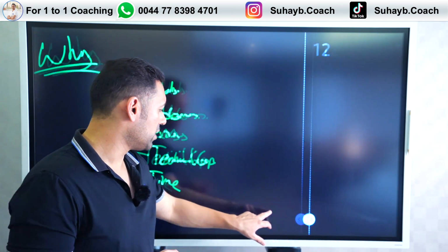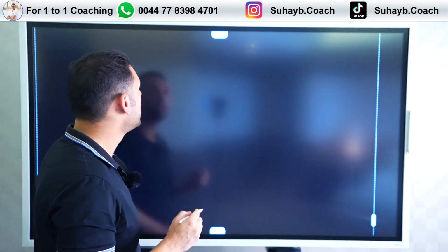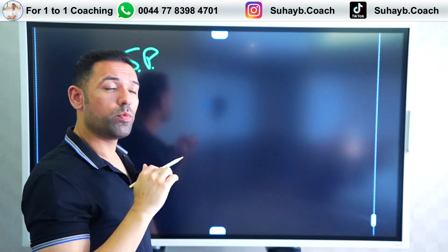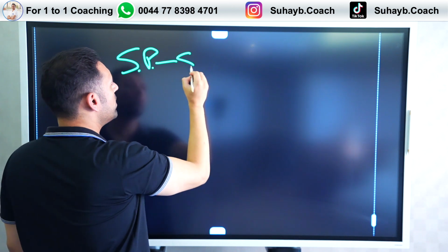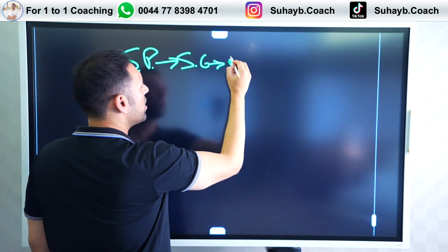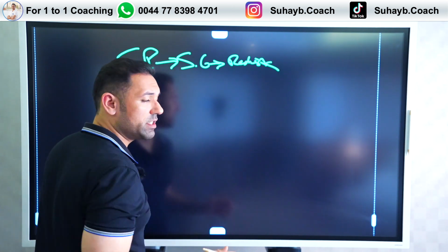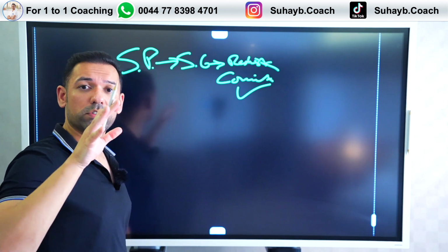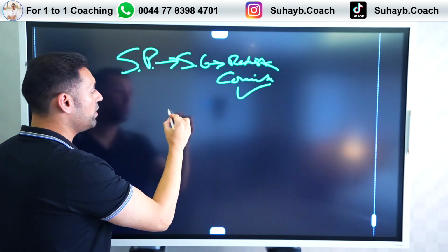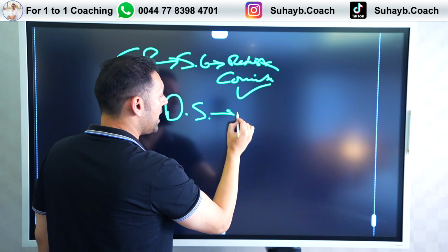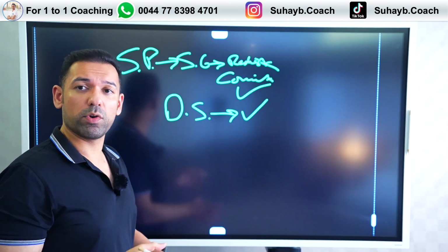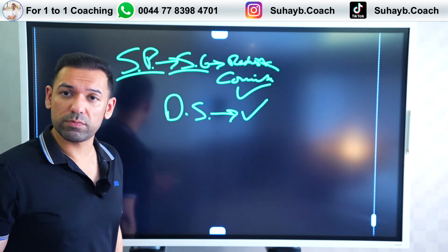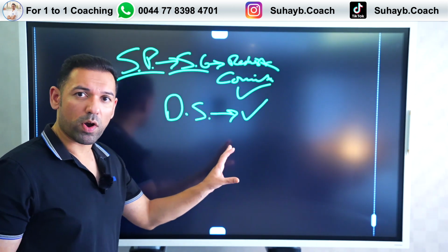And what we need to do is make sure that within the sprint planning, we have a sprint goal which is realistic, that the team can actually commit to and say, yes, we're going to achieve this, right? On top of that, we want to use the daily stand-up meetings to check if we are on track and able to deliver upon the promises that we agreed on within the sprint goal and the sprint planning session. So there are a couple of checkpoints going on there.